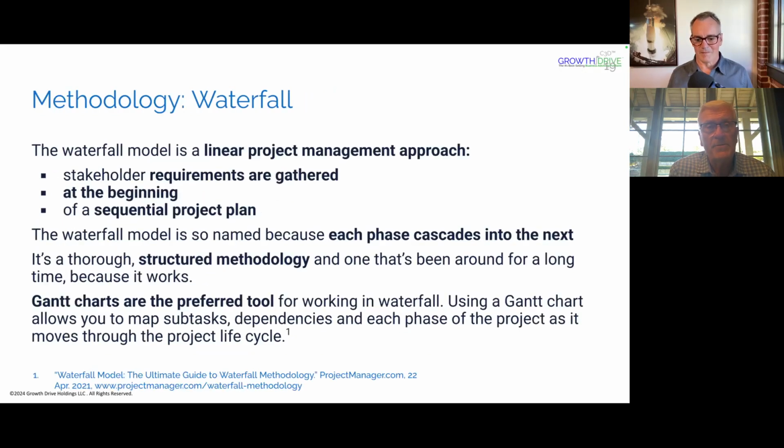That time frame of 1 to 3 months, I can't emphasize enough. Often management says they're going to get it done in 30 days. The reality is I have never seen them reach the 30-day timeline. It always takes 2 months to 2.5 months to get the first one done, because somebody isn't doing one part of it. And until it all gets together, it's like I've got 5 pieces to the puzzle, but I only have 3 pieces right now. I need 2 more to complete it. And I need time to get there, because those teams have to maybe do more, or they're hurting because they have a lack of people.